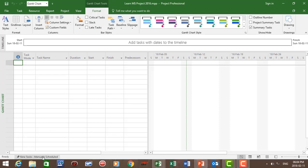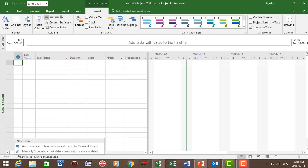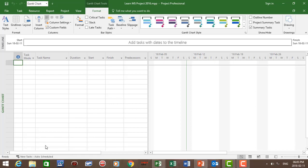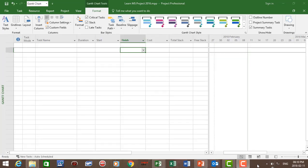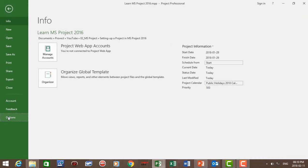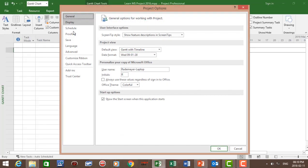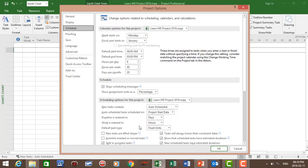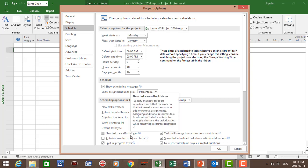At the bottom we've got our new task which is manual schedule. We're going to change that to auto schedule. You can click in the manual schedule area and change it to auto schedule, or you can go to File, Options, Schedule and change it to auto schedule. And for all the tasks in the project we're going to change the task type to fixed duration, and effort driven remains unticked.